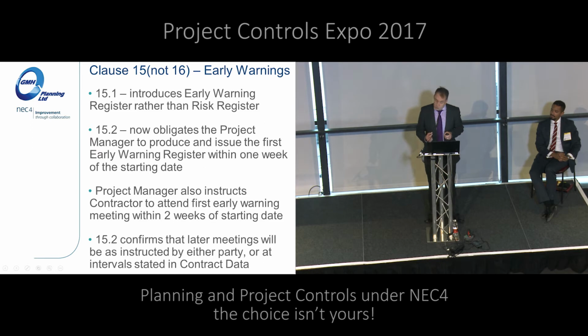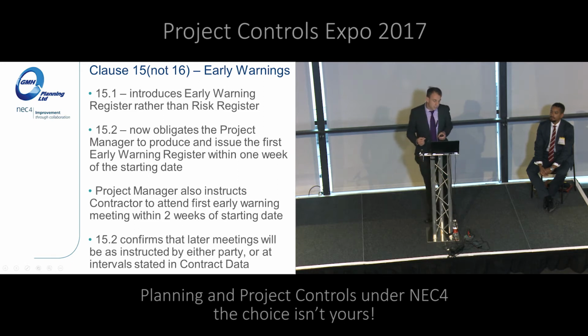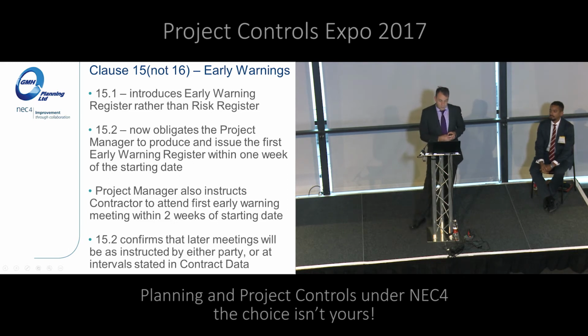Few bits of tidying up as well. It obligates the project manager to produce and issue the first early warning register within a week of the starting date, and also to have your first early warning meeting within 2 weeks of the starting date. So all those risks identified in Contract Data Part 1 or Data Part 2, you will discuss them early on.